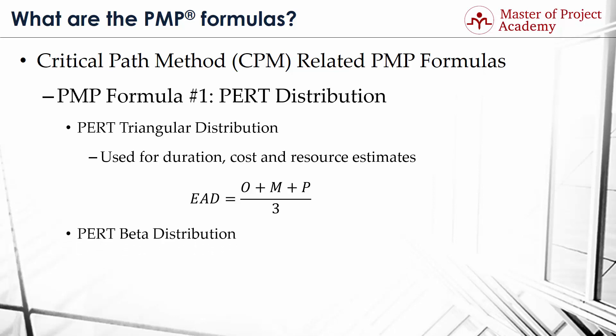PERT Beta Distribution is also one of the most important PMP formulas, and we use it to calculate duration, cost, and resource estimates. Similar to the previous formula, to calculate EAD, you need to determine activities' O, M, and P estimates first. Then you can use the PERT Beta Distribution to estimate the activity duration. Accordingly, the formula for the PERT Beta Distribution is as follows: EAD equals the sum of O plus 4M plus P, all divided by 6.